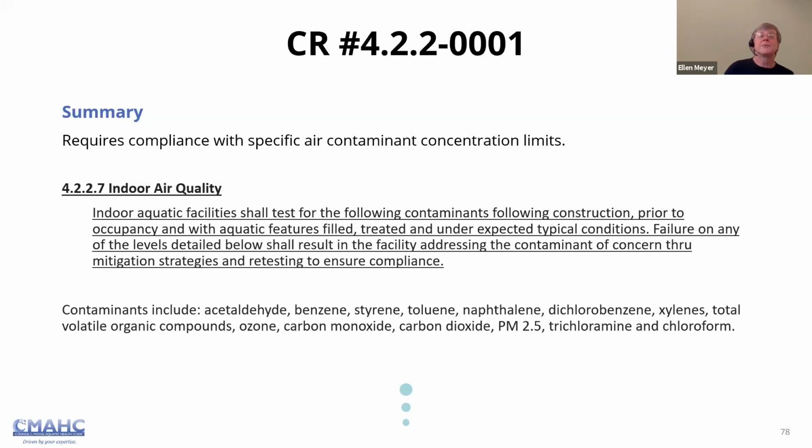This would require compliance with specific air contaminant concentration limits before a system could be signed off on and a facility could open. I didn't try to duplicate the entire change request on this slide because it wouldn't fit. It would have to be multiple slides. But basically, there's a requirement that before you open a facility, you need to test for a bunch of different contaminants, make sure that they reach certain criteria, and if not, then it needs to be remediated before you can open the facility.